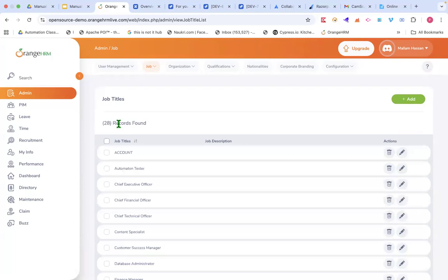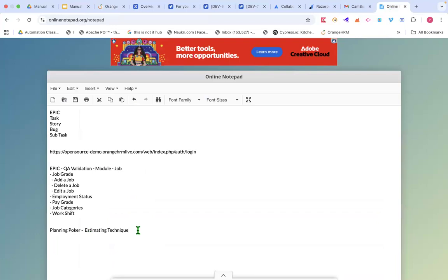Okay. So overall, this whole thing, if you notice, you can complete this validation within, let's say, 4 hours or something. Why am I saying 4 hours, guys? The reason is you need to validate in different browsers, with different user credentials. So this is what you should come up with in your logic, saying that I will be able to validate job title in half a day or, let's say, 6 hours or something. Okay.